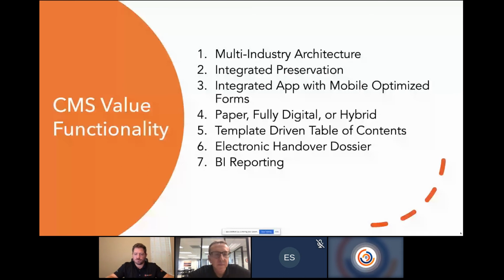Yeah, so specifically, if you're on an oil and gas platform, prior to bringing hydrocarbons onto the platform, you can take over devices depending on their security rules. But yeah, you could be doing it fully digital on your phones, on tablets and whatnot. But as soon as you bring hydrocarbons on, if you don't have intrinsically safe devices, yeah, you need the ability to switch over to paper.